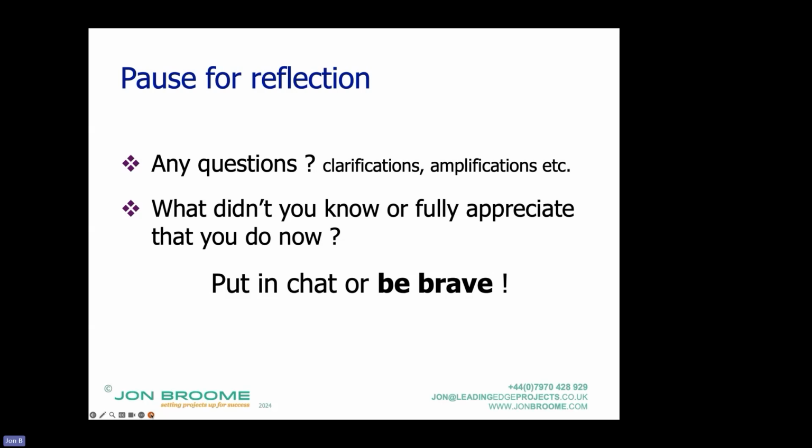But what you're highlighting there is one of the things we'll look at in subsequent sessions. If I was to go back and put up that slide on the process of developing the contract strategy, there's the fine tuning. And in that box, I said something like add or subtract compensation events. So the client could say, actually, I'm going to delete the physical conditions compensation event. Okay, you'll get higher prices, you'll get more certainty, but are you prepared to pay for that certainty?